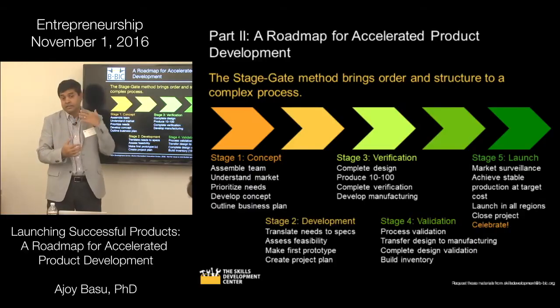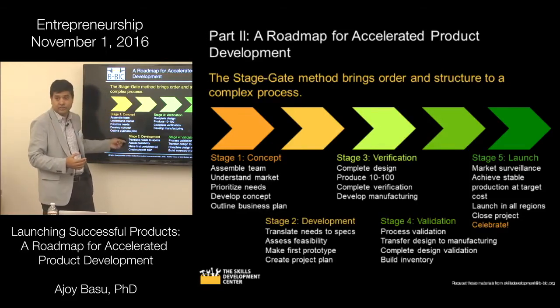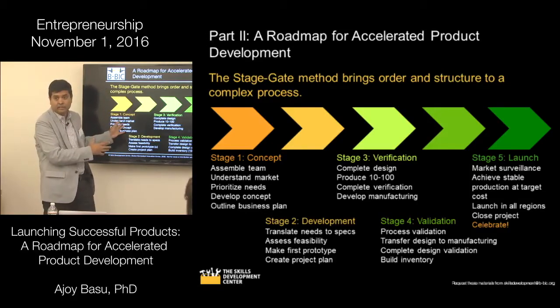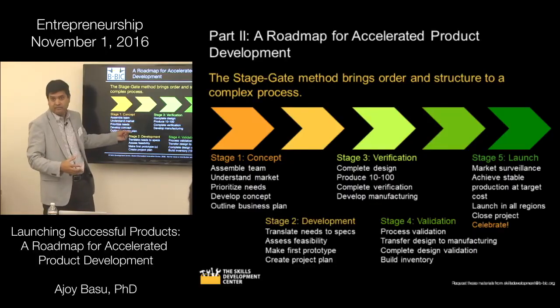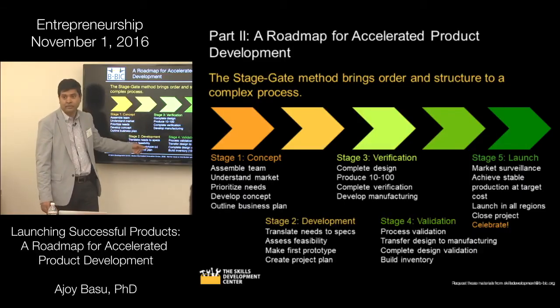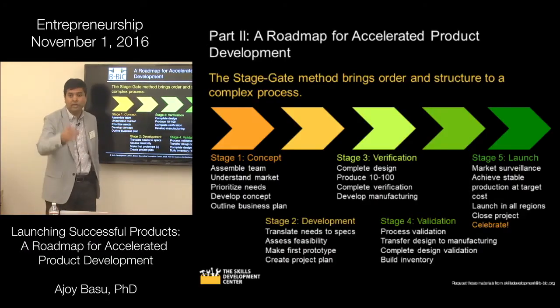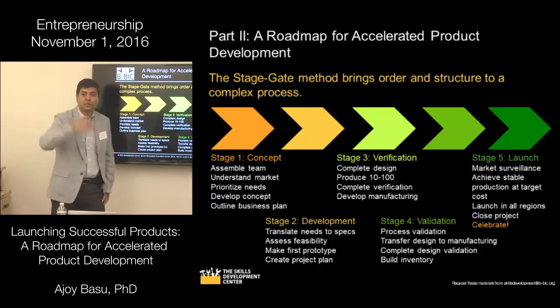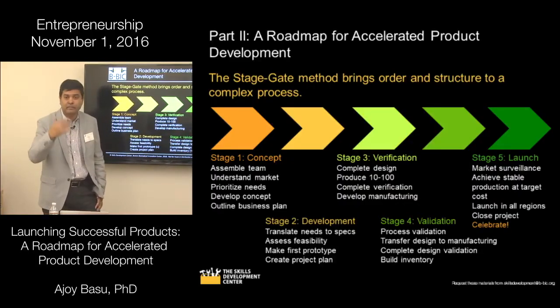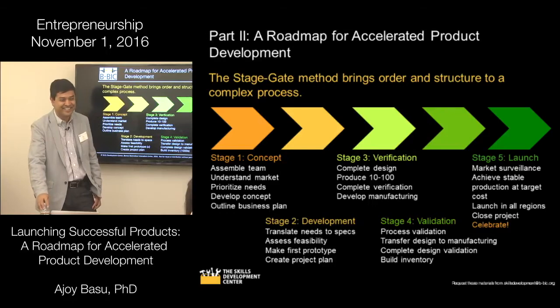Okay? Somebody is willing to pay you that much, and you say, I'll come back and answer these questions for you for that kind of money. And at that point we'll reevaluate if it still has that 50 million. This one, give me money to make the prototype. So if you ask for your money in tranches following this, the person you're asking is more convinced that you have been methodical, rather than just saying, give me $10 million 3 years later. It's hard to get money that way, very hard, right?